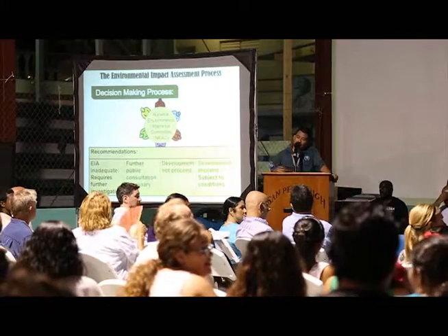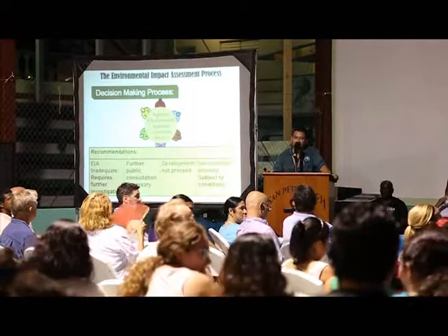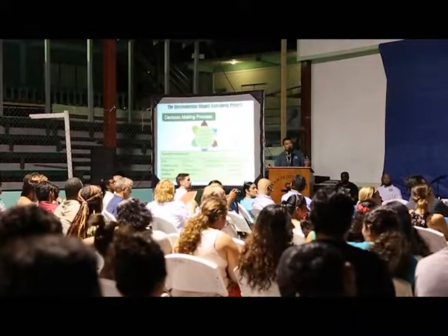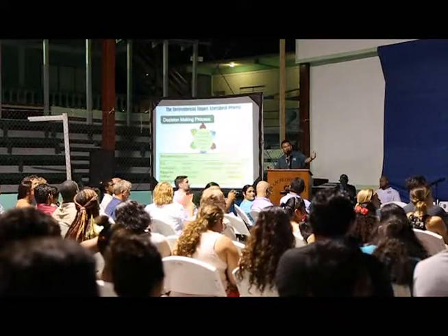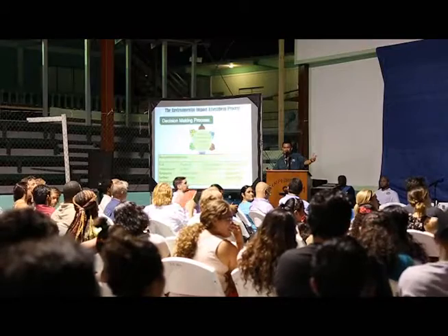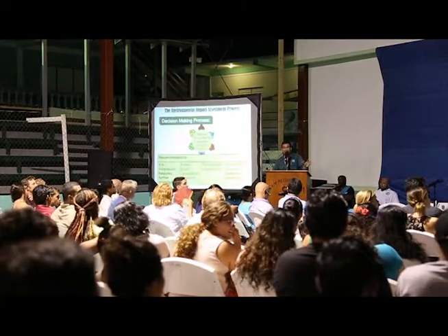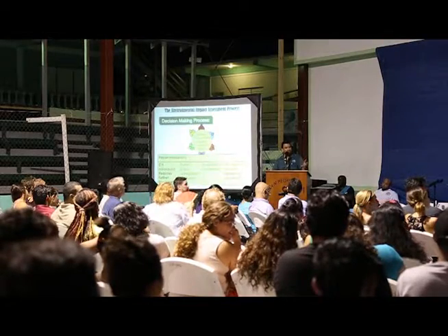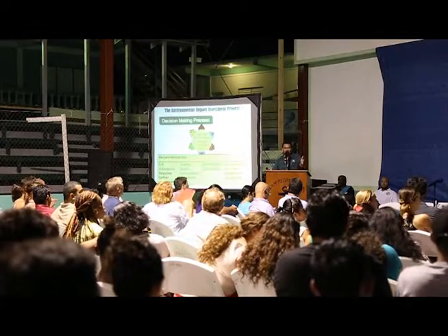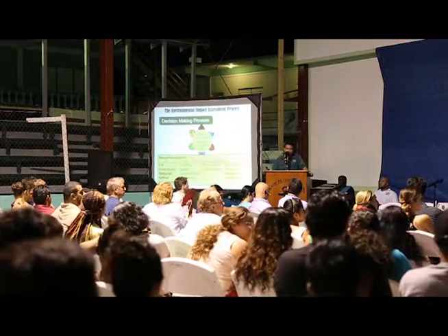So once we leave here tonight, and once the National Environmental Appraisal Committee meets on the 31st, they are presented with these possible recommendations that they can make to the Department of the Environment. The EIA is not adequate, requires additional information. There's an opportunity then given to the developer to do such. We require further public consultation.